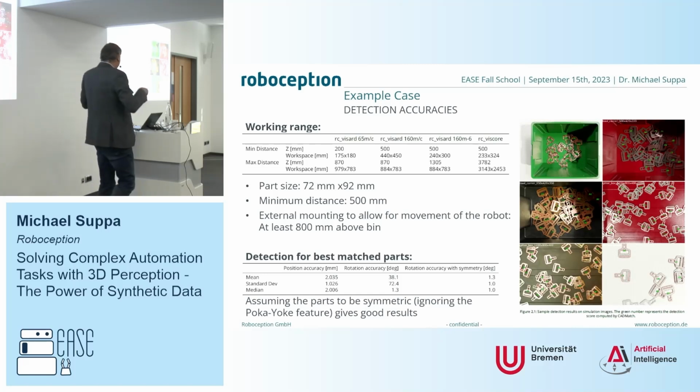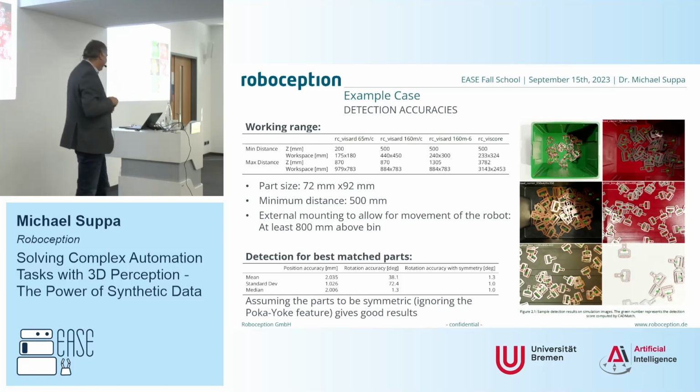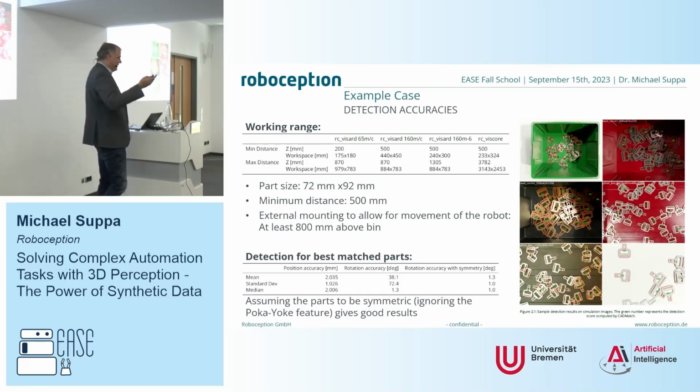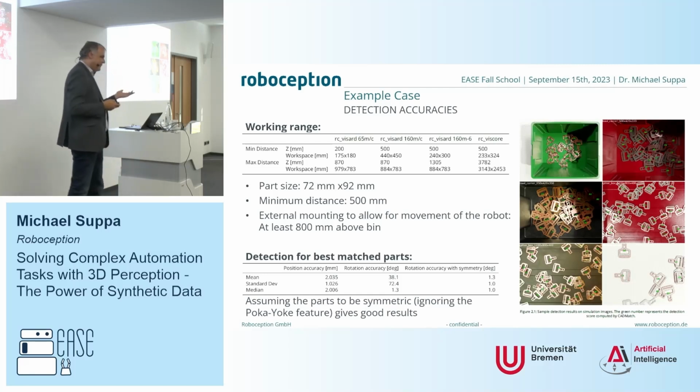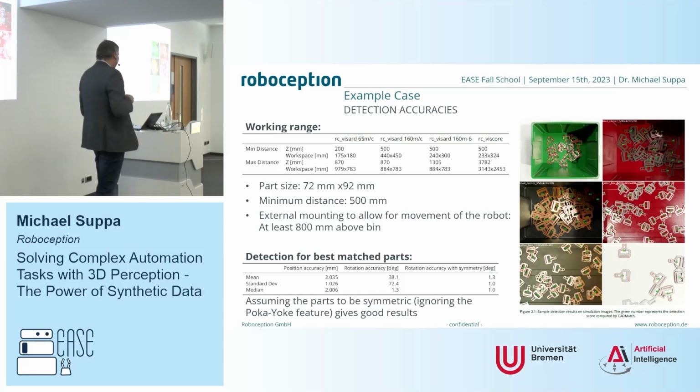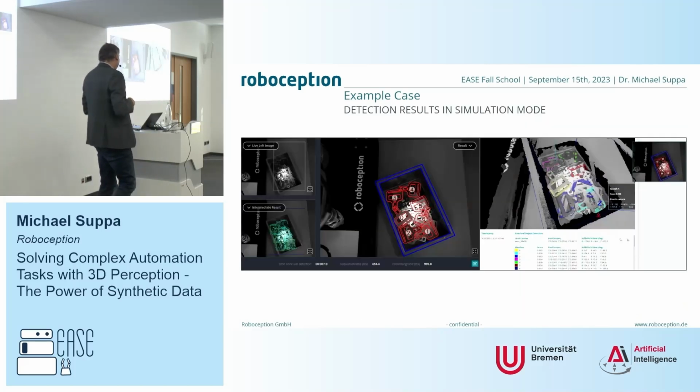So basically, that's also always possible, and that's one of the decisions you have to take early in the process, because this flipping station needs some space, it needs to come from somewhere. You have to discuss with the customer regarding cycle time and so on. So this is why the simulation is very helpful, because we saw in the first half hour what the problem in this case is without even having tested the case.